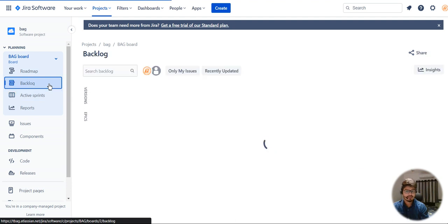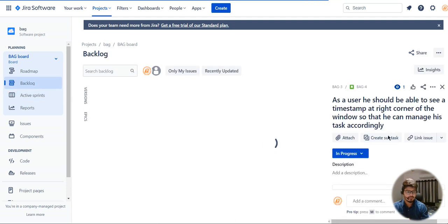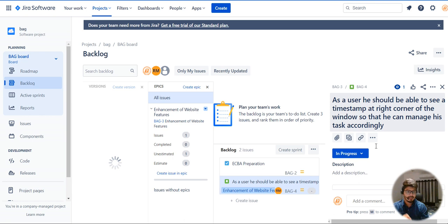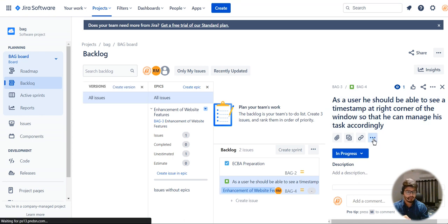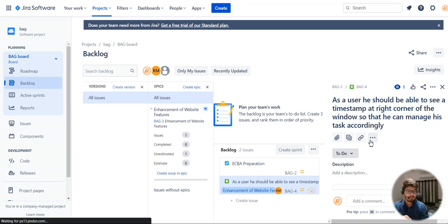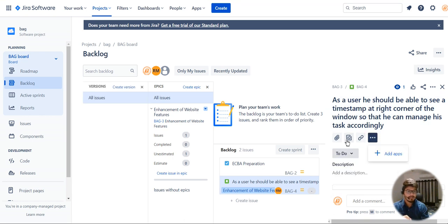These stories are created under backlog. I want to make sure this is assigned to a particular board — I need to move it from backlog to a sprint.